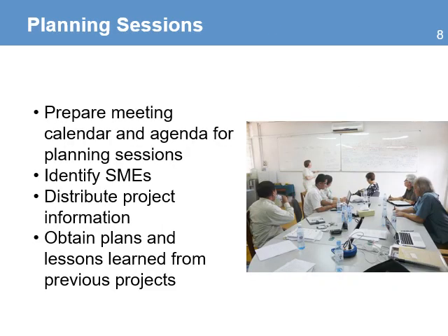The next step is to start preparing the planning sessions. As the project manager, you need to organize and prepare a series of meetings to develop all the implementation plans. You will need to prepare a detailed agenda for the planning sessions. You also need to identify subject matter experts. These are people within the organization or external consultants that can bring their experience during the planning sessions, and could be other key stakeholders that can bring expertise and knowledge.